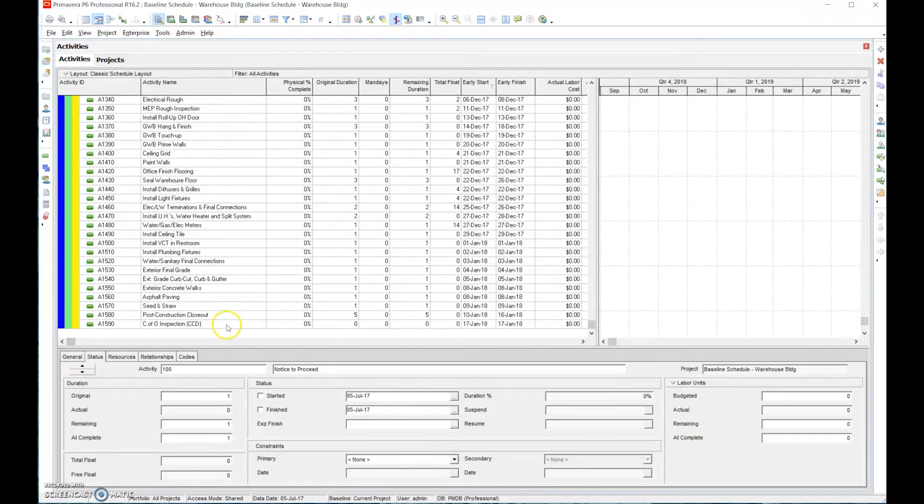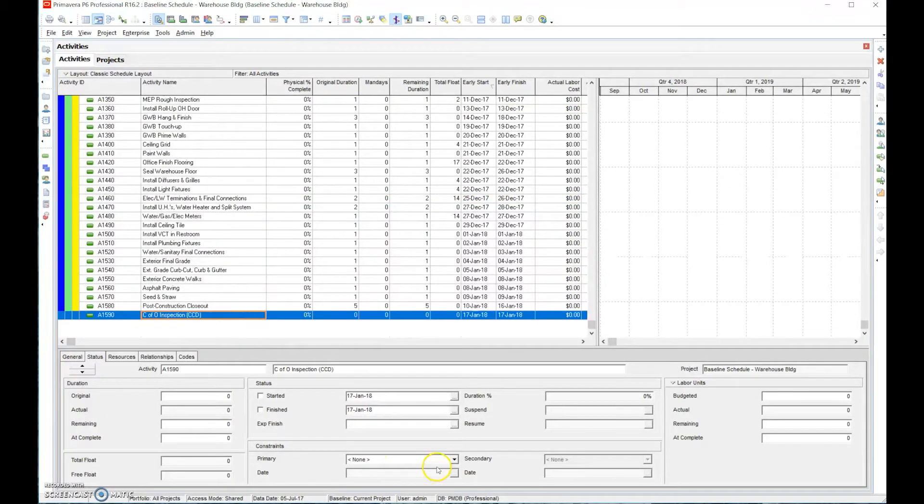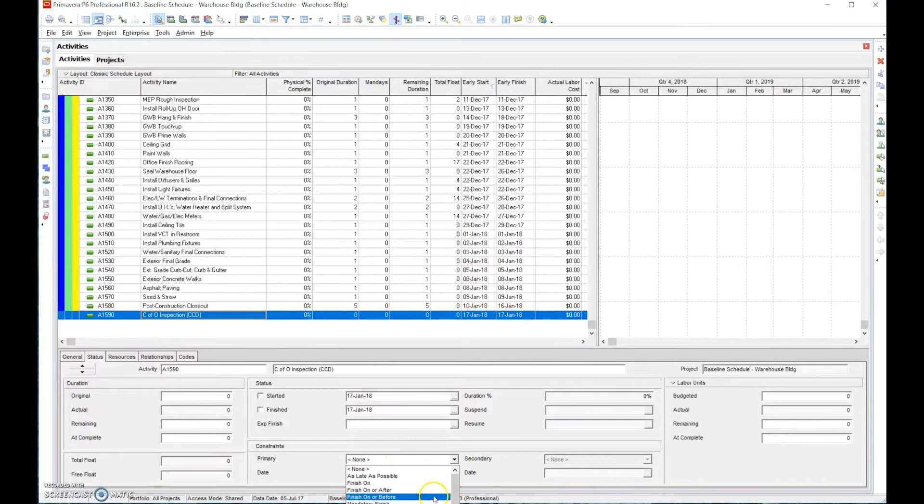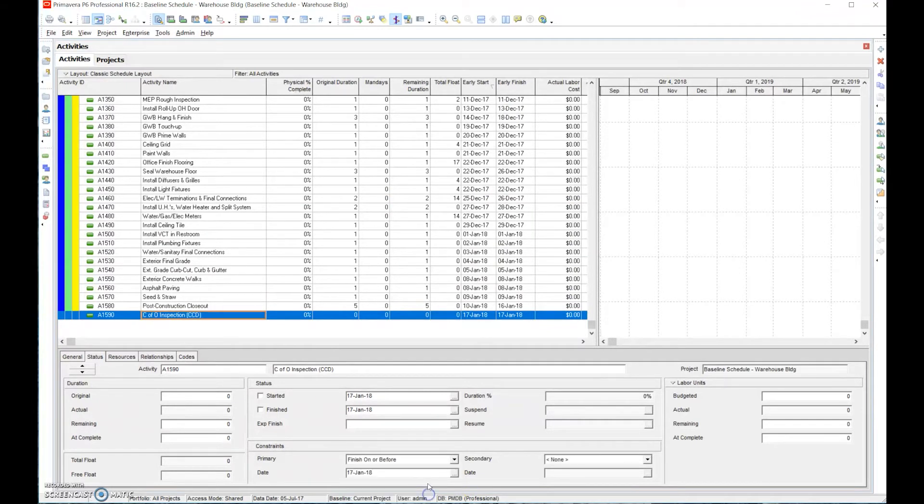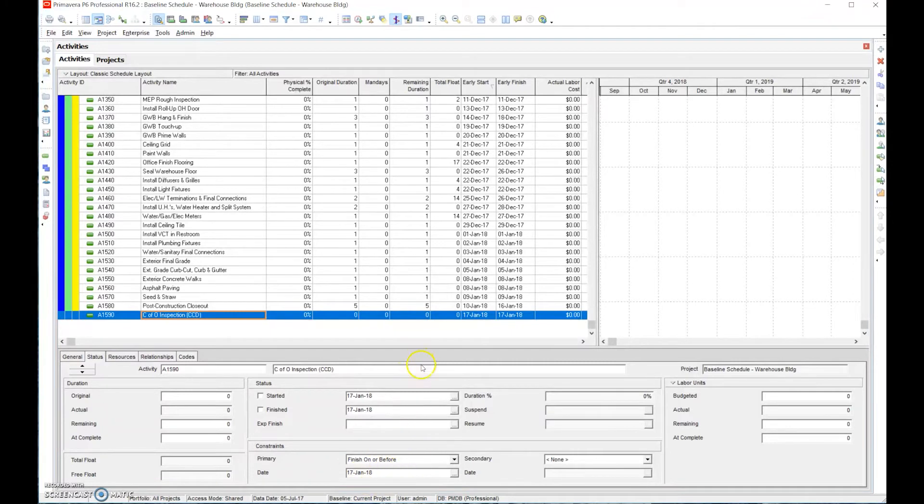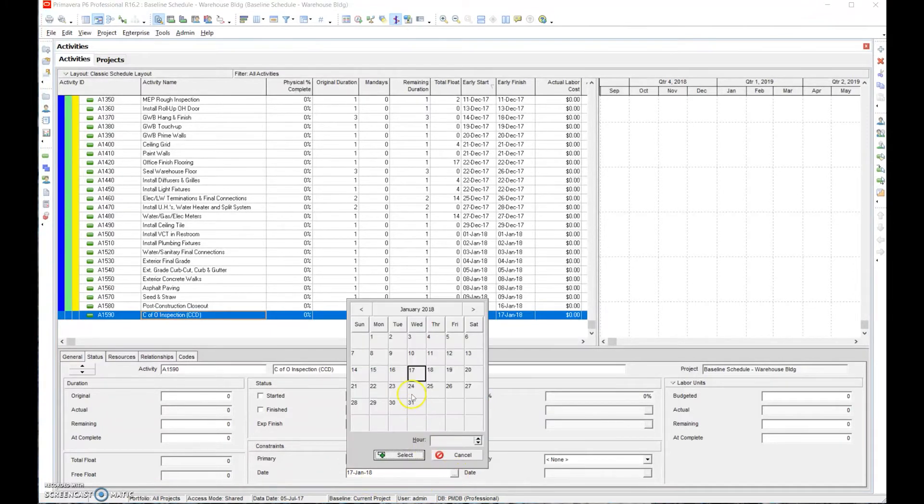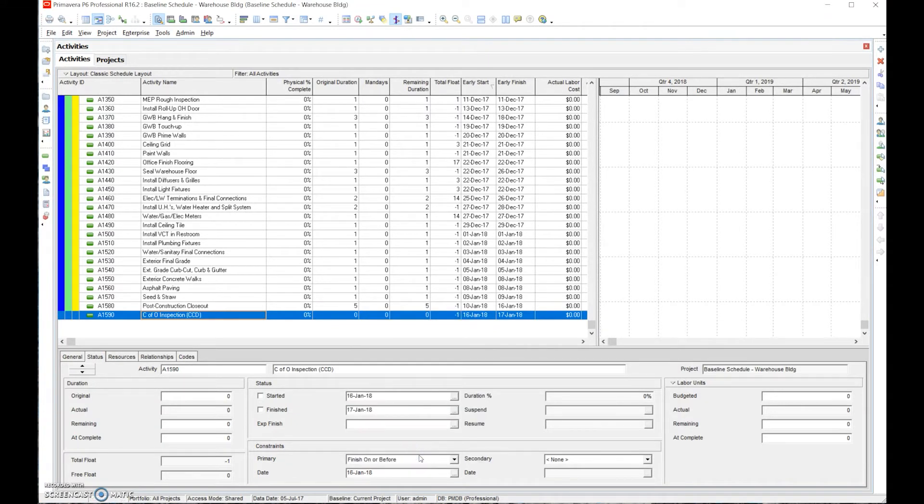The proper way to do it is just put a constraint on the last activity, finish on or before a specific date. It automatically populates it with that specific date. Now, if I were to say, okay, it's got to be the 16th, it should show negative numbers up there. And it does, it showed negative one day.